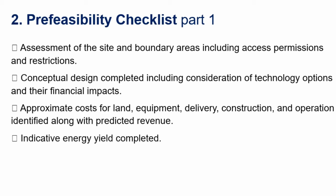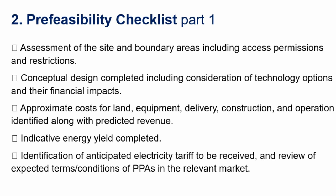An indicator of energy yield completed — given the site conditions, temperature, and so on, you can do a temperature estimation with software to find the operation temperature. With irradiance tables — either from software like Meteonorm, GIS, or ground measurements — you can give first estimations of the energy yield and also the financial yield. Identification of the anticipated electricity tariff and review of expected terms and conditions of the PPA in the relevant market. For example, in Germany they buy any kilowatt-hour generated independent of the time, while other countries require a certain number of full load hours per year, or give different tariffs for day and night time.